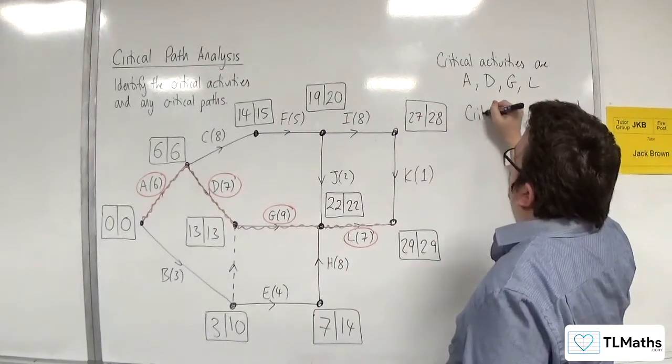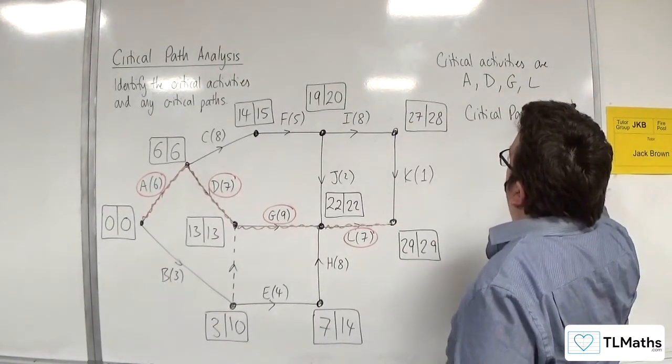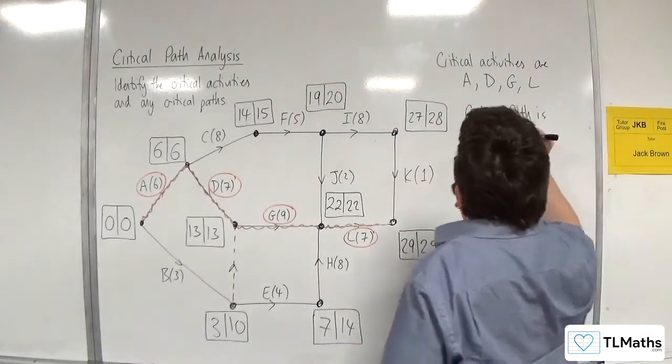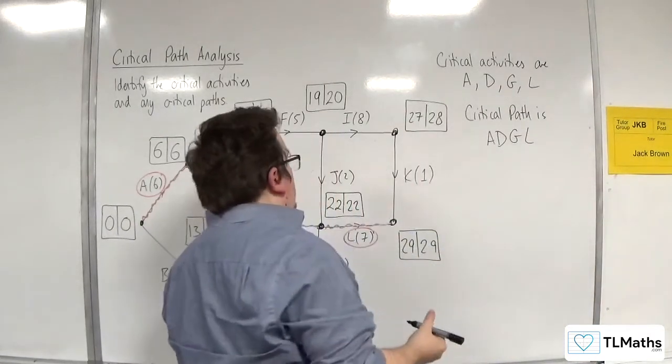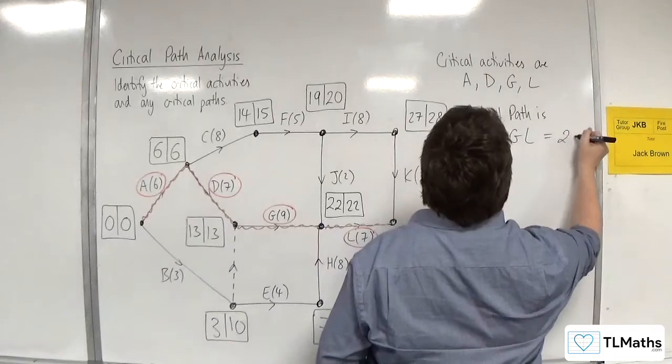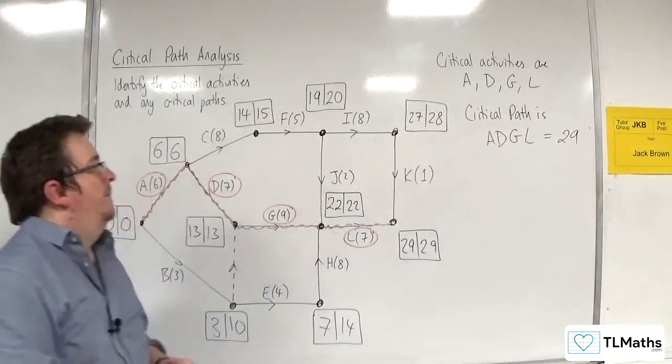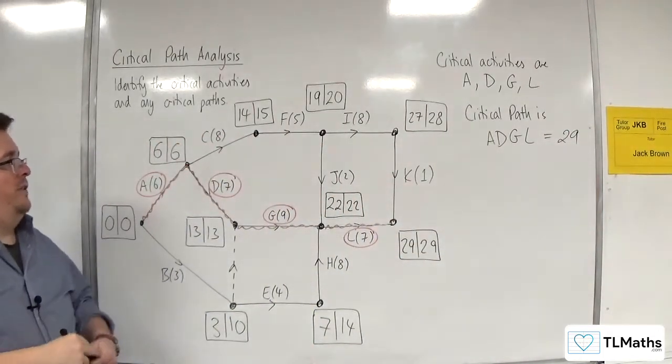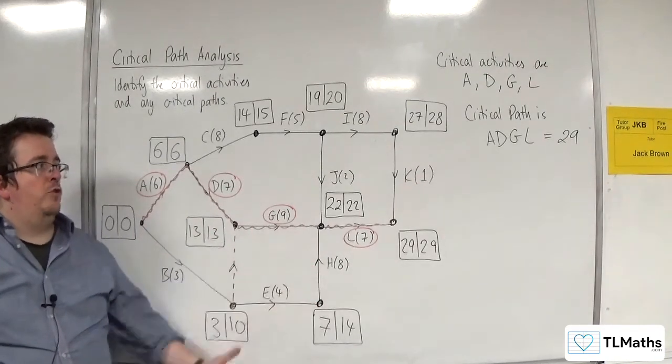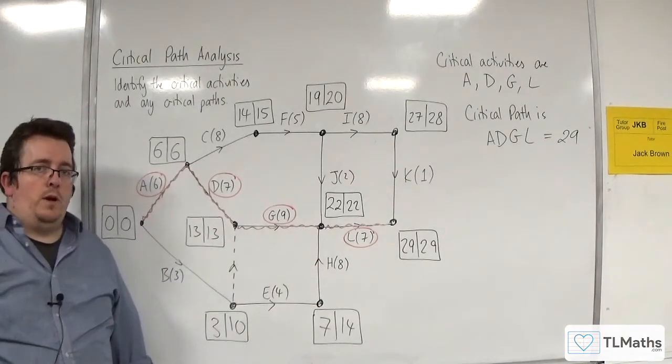Now, the critical path is A, D, G, L, and that is equivalent to 29. So that's how we can identify the critical activities and the critical path in an activity network. Good luck.